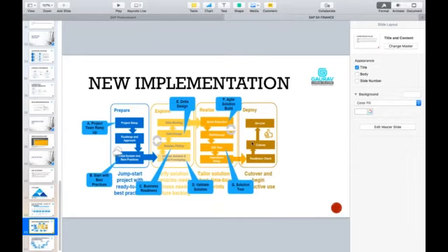In order to avoid that, in SAP Activate, there is something called sprint execution. So instead of doing all the realization at once, taking 4 or 5 months, let's do weekly realizations. You decide what you want to complete this week. Okay, so make a weekly plan. For example, in this week, I will set up the enterprise structure.